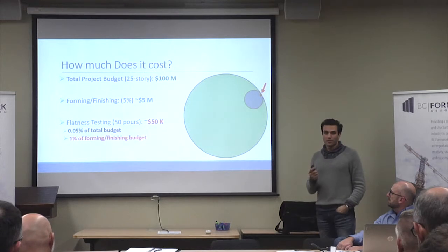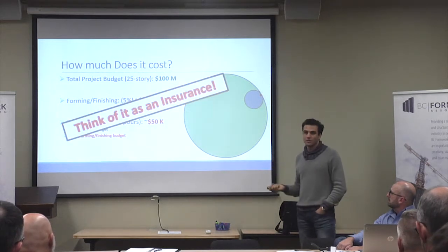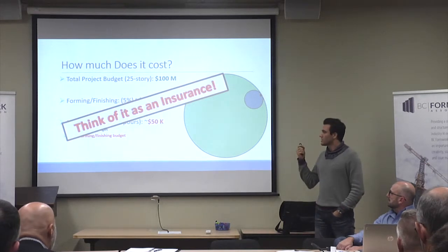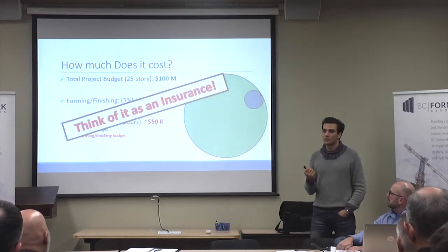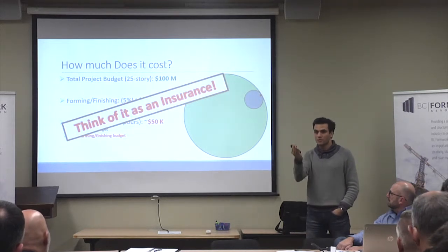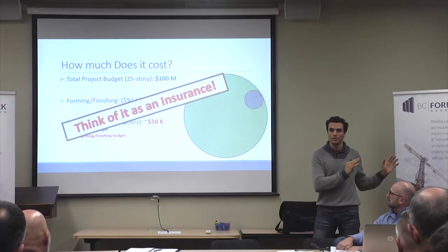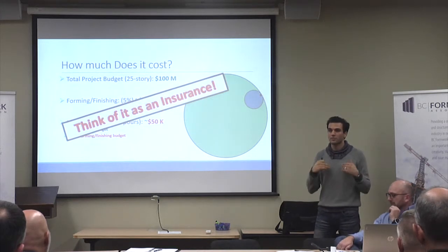So my 2 cents here is basically to think of it, as you all mentioned, as insurance for yourself. If you have done a good job, spend 1% of the budget on testing it and then use it as proof that you did your part, and whatever has happened since then is not your fault. And we are there to protect you.